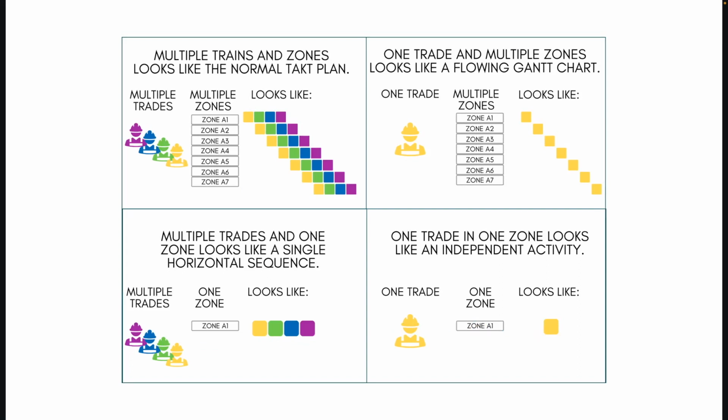So in the Takt production system, and specifically on your Takt plan itself, there is nothing wrong with putting on your format independent activities, like the erection of your tower crane, or the installation of your buck hoist, or the completion or the delivery of the air handlers for the roof, right? So you can have all of these repetitive phases on your Takt plan, and you can add any of the critical one-off activities, independent activities that you need to in order to complete the sequence, and especially the path of critical flow.